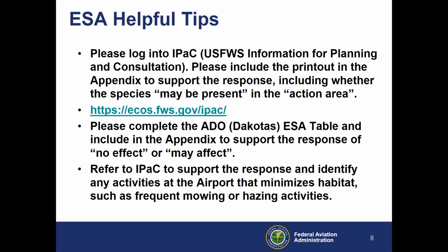Some of the helpful tips we've developed over the years under some of these special purpose laws. For endangered species, we like to use IPAC. That's a Fish and Wildlife website, Information for Planning and Consultation, where you log in and identify your project areas, that's labeled as action area, and be sure to include your limits of construction that might have your access road, your staging, your borrow or aggregate locations.